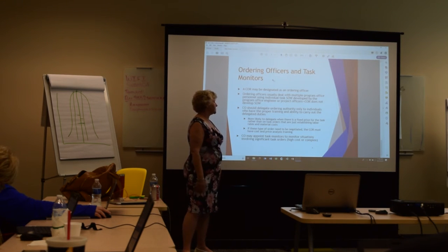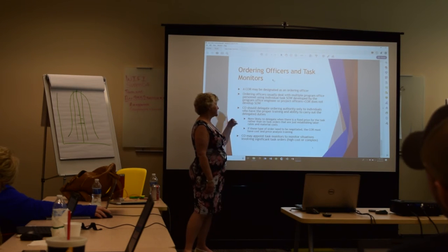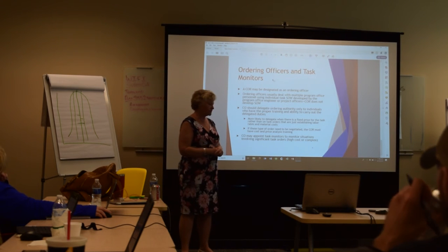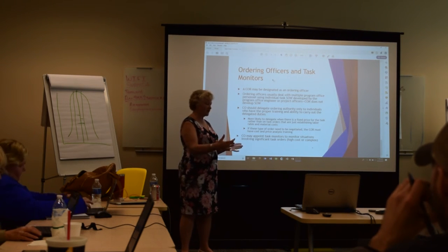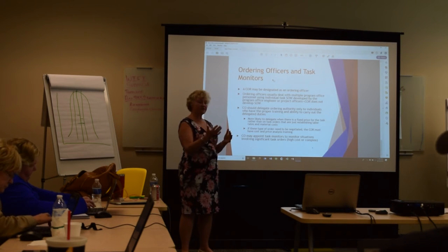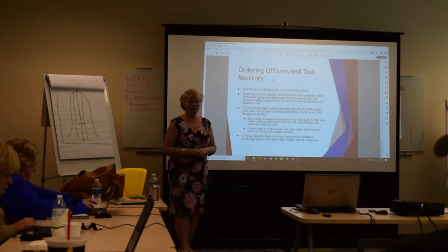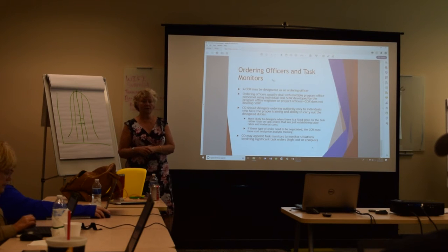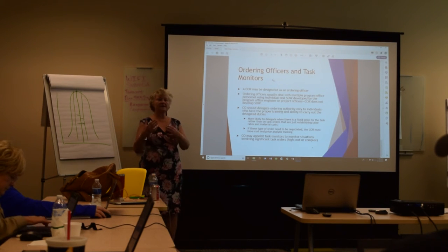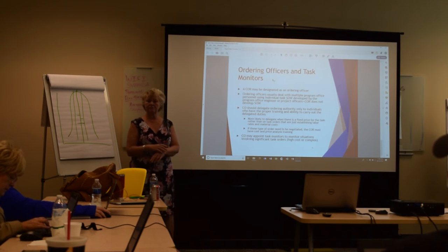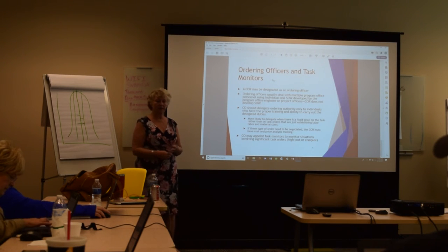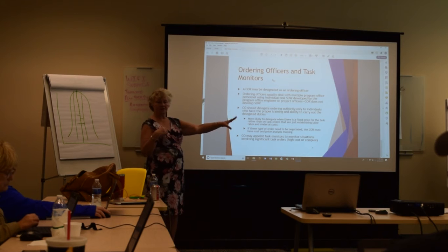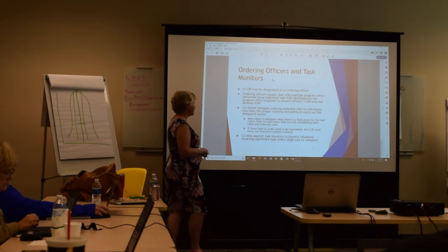More likely to delegate when there's a fixed price for the task rather than on task orders establishing labor rates and material costs. So in order to get this task order proposal set up, you typically give them the labor rates. At that point, they just have to verify that your rates are okay. But if they actually say, okay, here is a piece of work that you need to perform, give us your proposal on this, they need to verify, they need to have a lot of controls in place to make sure all your costs are allowable. They have to verify you're doing the work and all that other stuff, because now you've actually got a piece of work. When you have labor rates, you just have labor rates on the contract. You're not required to do anything.